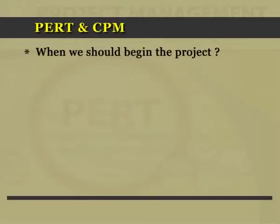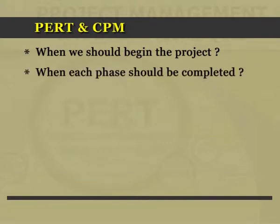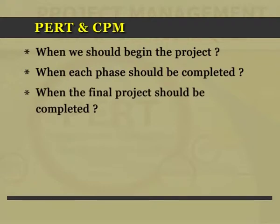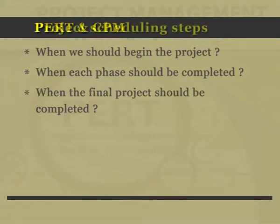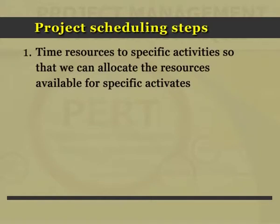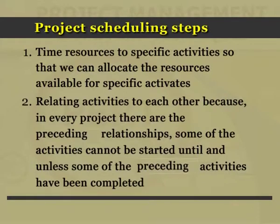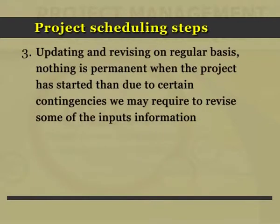For project scheduling — deciding when to begin the project, when each phase should be completed, and when the project should finally be completed — three steps are needed: tying resources to specific activities, relating activities to each other based on preceding relationships (since some activities cannot start until preceding ones are completed), and updating and revising on a regular basis, as contingencies may require revisions to the input information.